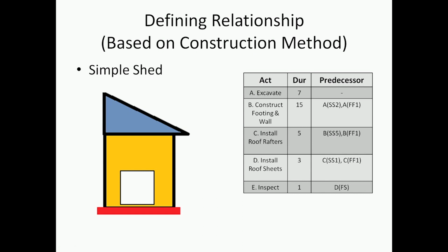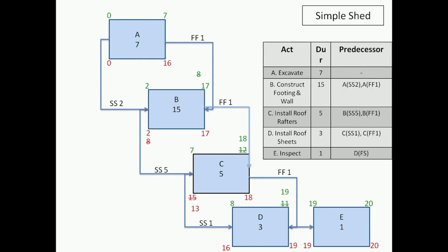If I take excavation and break it into excavation A1, A2, A3, and then B1, B2, B3, and C1, C2, C3, and represent it in an activity on node network, you certainly have to handle more activities, but that's an option which is possible.